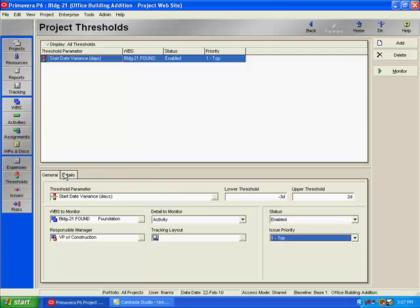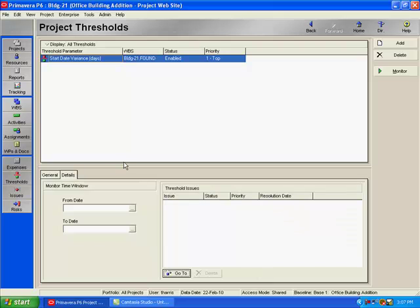Let's go to the details tab. On the details tab, you can select a from and a to date in the monitor time window area. And what this will do, it will monitor activities in WBS elements whose start dates exceed the to date, or whose finish dates precede the from date. So those activities will be excluded from the threshold monitor, and therefore no issues will be generated.